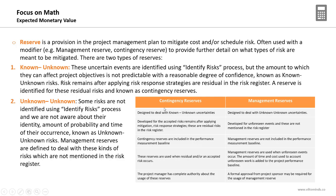Comparing the two types: contingency reserves are designed to deal with known unknowns and are developed for accepted/residual risks in the risk register. They are part of the performance measurement baseline (cost baseline). The project manager has complete authority over contingency reserves. Management reserves are designed for unknown unknowns — unforeseen events not in the risk register. They are NOT part of the cost baseline, and using them requires formal approval from the project sponsor.